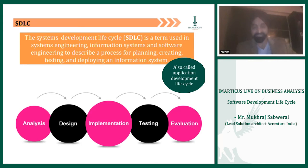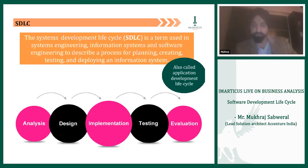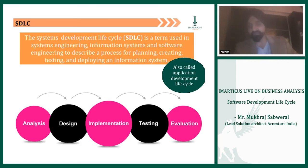The automated process is installed as of tomorrow. This whole analysis — in terms of cost, benefit, risk, and challenges — is all done by our business analyst Rajesh. Rajesh typically spends 10 to 15 percent of the project timeline in doing this analysis part. For example, in a hundred or a thousand man-day project, Rajesh typically gets about 100 man-days to do this kind of analysis, which is very deep and evaluative.